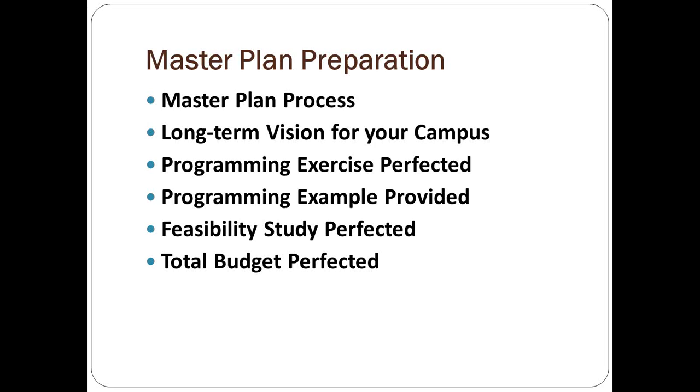Now, let me talk to you about something that often is misunderstood. You as a church get to pick 2 of the following three things about your new facility and campus. The three things are the size of your project, the cost of your project, or the quality of your project. You can pick the size and quality, and cost is dictated to you.